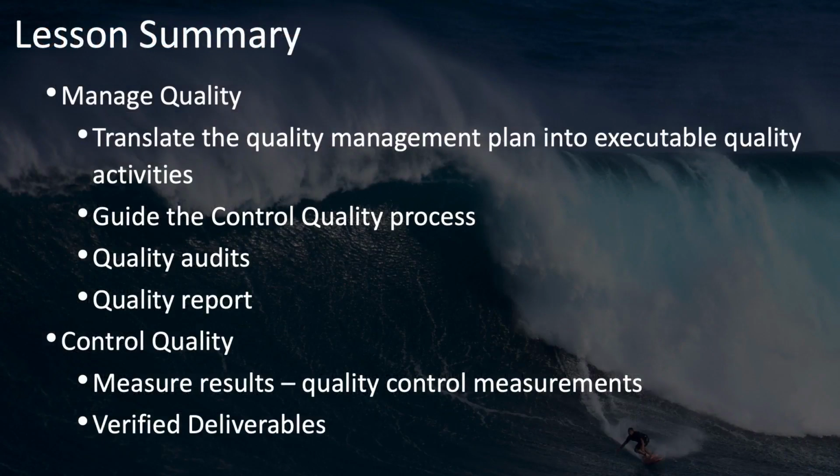To summarize the differences between managed quality and control quality, managed quality is about translating the quality management plan into those quality activities that need to be performed. It guides the control quality process and manages quality audits and outputs the quality report, whereas control quality is about measuring the results, the quality control measurements, and verifying deliverables to make sure that they meet your quality requirements.